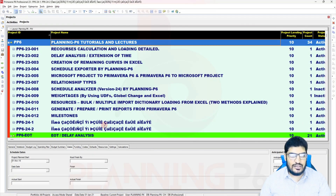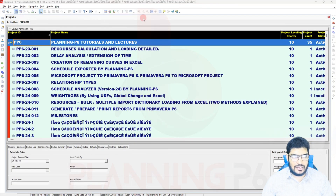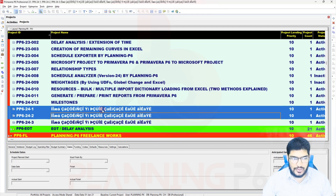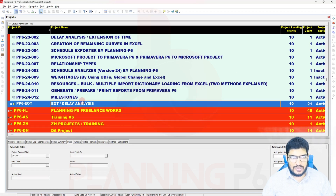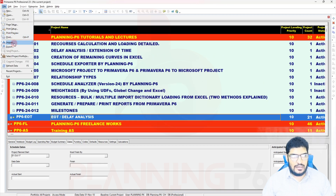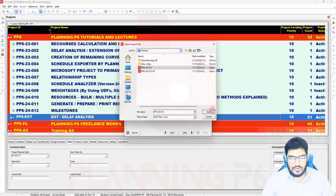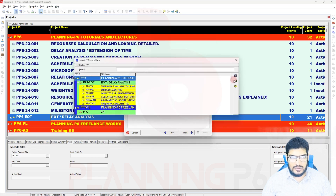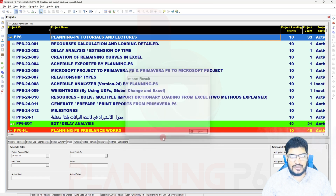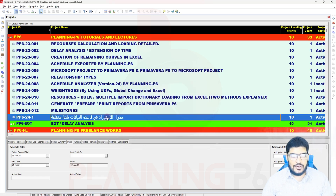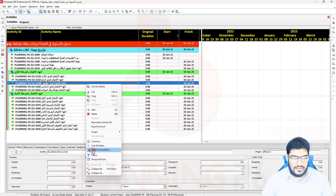After restarting, I go to the project tab and delete the previously imported projects from the database. Once deleted, I go to File > Import, select the same XER file from the desktop, choose Enterprise, click Next and Finish. Now you can see the schedule has been imported and the Arabic language is displaying correctly — all the text is now visible.